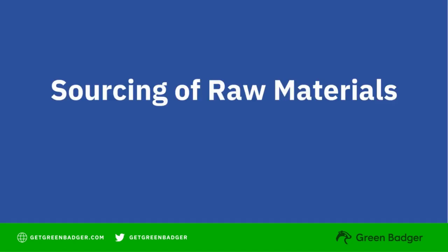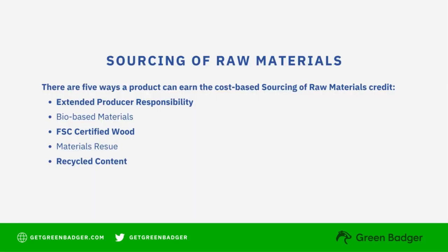Next up is sourcing of raw materials. There are five ways to earn this credit, but most often products have an extended producer responsibility program — a fancy name for a take-back program — FSC certified wood, or recycled content. It's very uncommon to see bio-based materials, salvage materials, or material reuse.